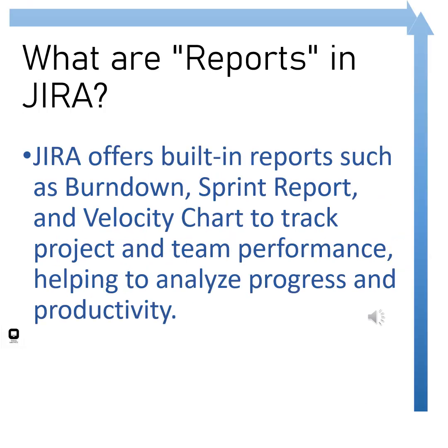What are reports in JIRA? So reports in JIRA are an important tool to verify how the project is going on. So it is like a tracking tool which will be helpful for tracking project and team performance, and it will be useful for analyzing progress and productivity. So JIRA offers built-in reports such as burn down, sprint report, and velocity charts.